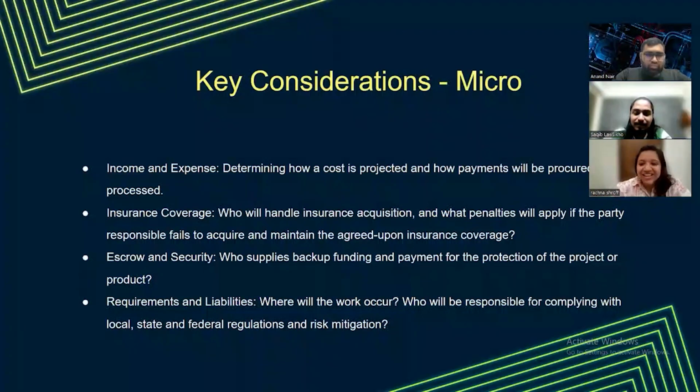Escrow and security: who supplies backup funding and payment. You see, this is again escrow and security. I've only seen it while dealing with a very huge amount of transactions, where they say that your operational money should be separate from the other money that is coming in, which may be related to this particular agreement, and it should be put into an escrow account. That is when an escrow comes into operation. Like in a gaming company, they say whatever your operational cost is, put it into one account, and whatever money you're collecting from the players, you put it into another account, so that the players' money is never held back if you go bankrupt. That is when escrow and security comes in.